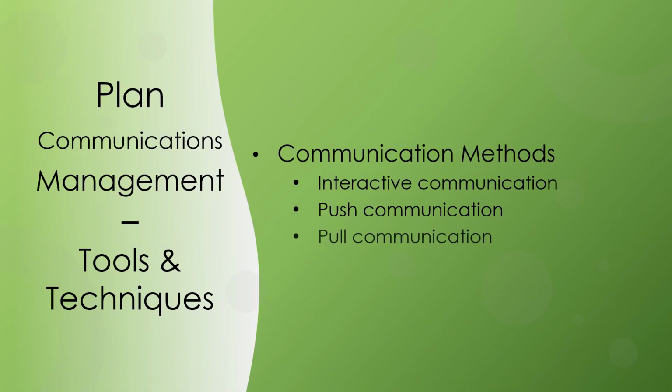Pull communication. Used for large complex information sets or for large audiences, and requires the recipients to access content at their own discretion, subject to security procedures. These methods include web portals, internet sites, e-learning, lessons learned databases, or knowledge repositories.